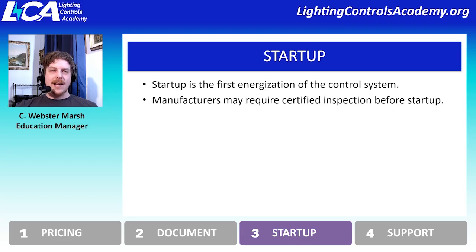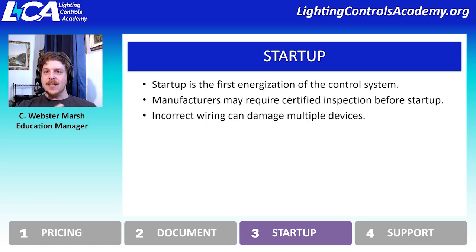So a lot of manufacturers will say, we need to have somebody go on site and inspect before we can get into startup to make sure that it's wired correctly, or things are going to get fried because of incorrect installation.